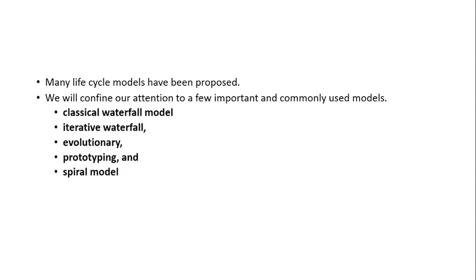So the customer will ask the developer to develop the registration module only first. In the first iteration only the registration module will be given. Then in the second iteration, now we got 2 months time. Say registration starts in the month of March. Then counseling will take place somewhere around May. So I have 2 months.